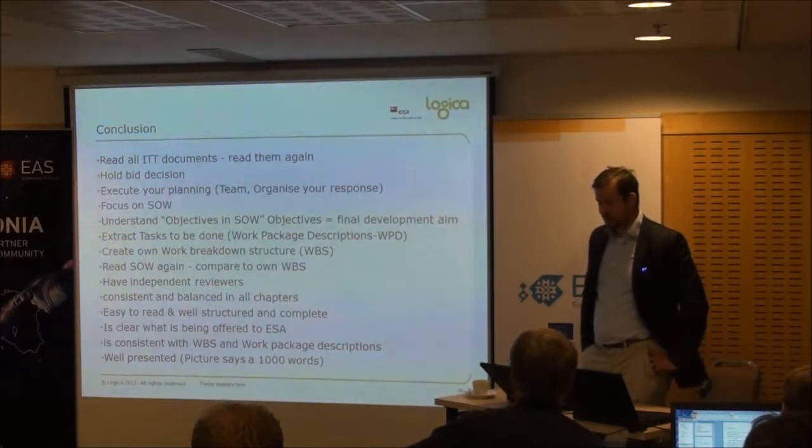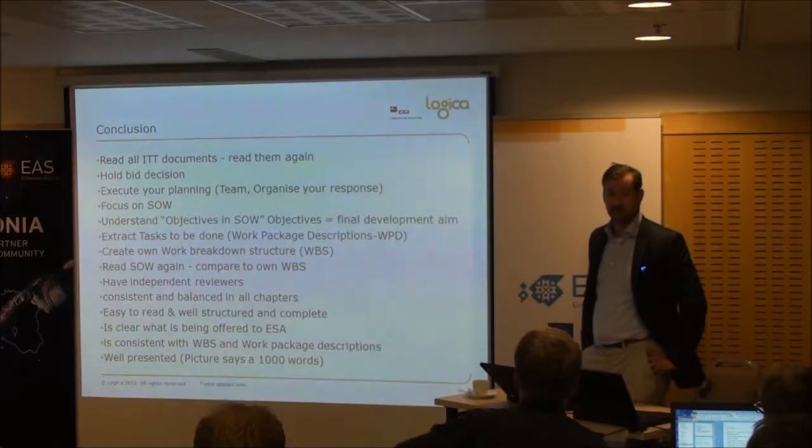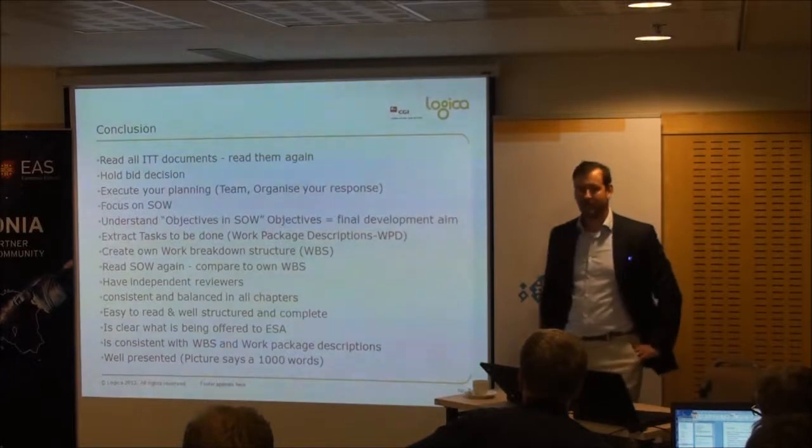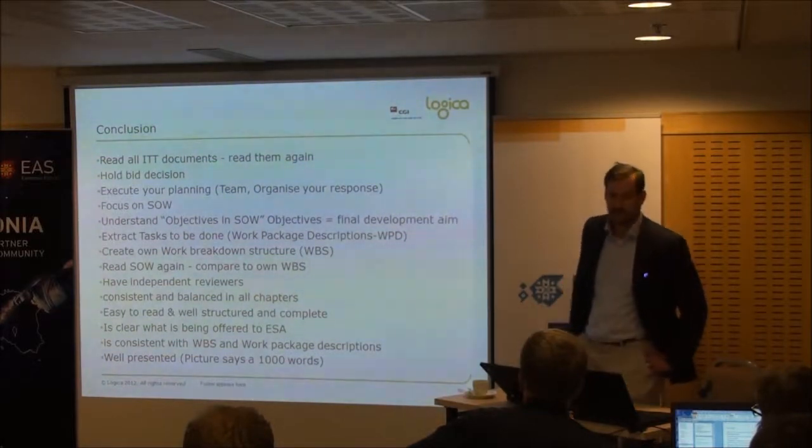Read the statement of work and compare it against the work breakdown structure you've put in place. So it's just a simple check to make sure you've not missed anything. Have independent reviewers. That really is a very wise thing to do if you've got it.